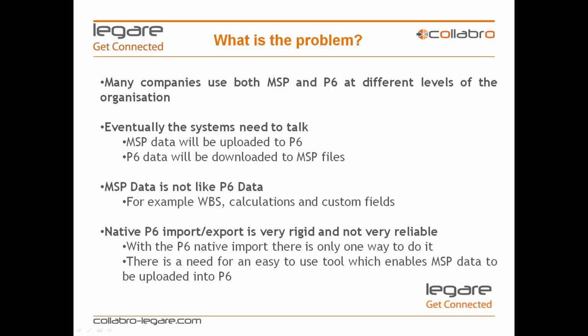MSP data is going to need to be uploaded to P6, or P6 data is going to need to be downloaded to MSP files. The main problem with this is that MSP data is not like P6 data. For example, WBSs, calculations, and custom fields all work differently. The other problem is that the native P6 import-export facility is very rigid and doesn't have a lot of flexibility. There's only one way to do the import.